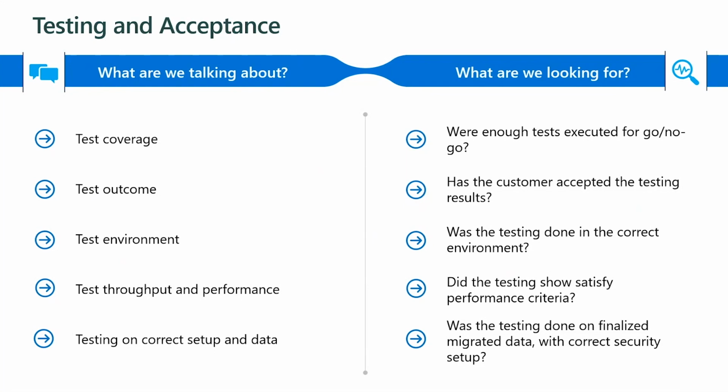Now, if you determine that the customer isn't ready, but the customer still insists on going forward with the go live, you should in fact let them know that they aren't ready for the go live. Instead, you should schedule additional follow-ups and ensure that any required activities are completed.